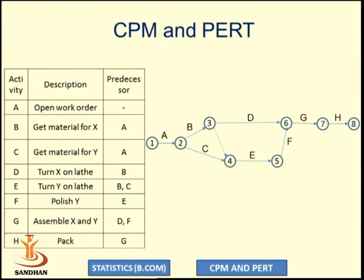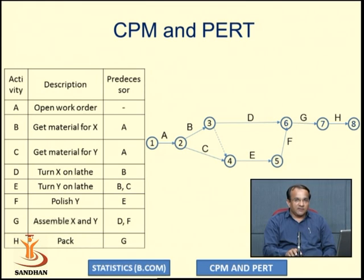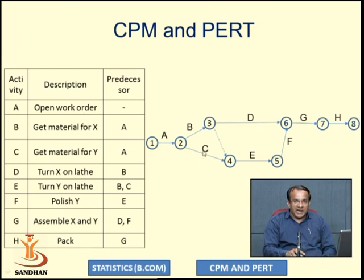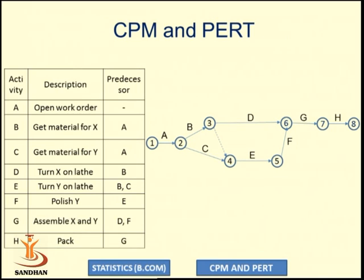Activity A is the first activity with no predecessor, while A is a predecessor for activities B and C. So B and C start after A is completed, while B is the predecessor for D. B and C are predecessors for E, so B and C must be completed before starting E. We use a dummy activity because we cannot join activity B directly from node 2 to node 4, as that would create a parallel activity, which should not occur in a network diagram. The dummy is used to satisfy the logical precedence relationship.